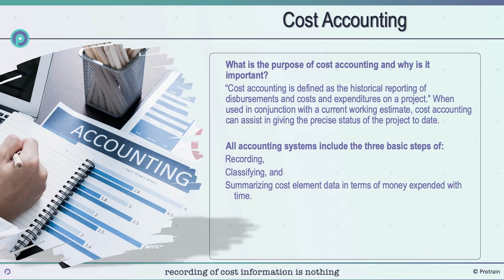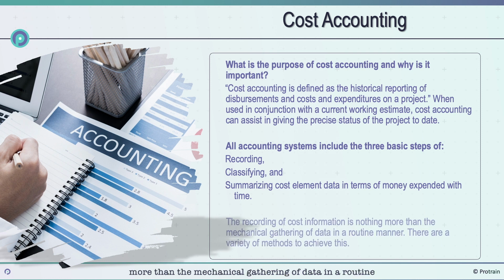The recording of cost information is nothing more than the mechanical gathering of data in a routine manner. There are a variety of methods to achieve this. Generally, it's accomplished with timesheets for labor and invoices for subcontracts and procured items. Other costs are gathered from utility bills, expense reports, tax bills, etc.